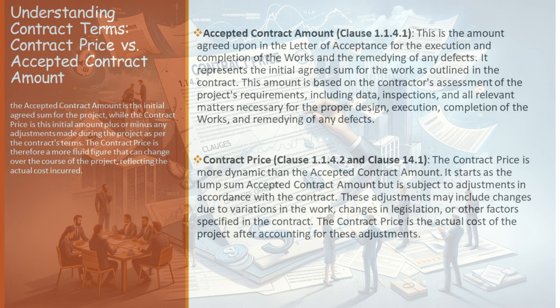But what about situations where the actual progress of the project is less than what was initially planned? This is where Clause 14.4 comes into play. If the contract includes a schedule of payments, and the actual progress is less than expected, the engineer may revise the installments. This ensures that payments are aligned with the actual progress of the work, maintaining fairness and transparency in financial dealings.